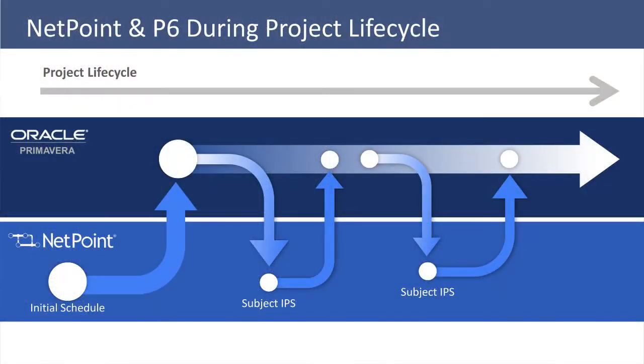And as we transitioned, right now we are in, I'd say, basic design, working towards our design development. We have a CM that just got onboarded in the last couple weeks. And PMA has been involved for the last year. So during that last year, we were taking the schedule through early development, schematic design development, starting from 0 and moving towards a Netpoint file that had about 500 to 800 activities.